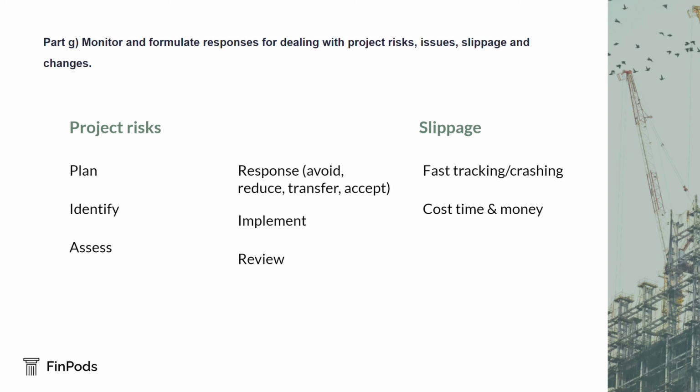When considering a change, the project manager should conduct an investigation to discover: a. The consequences of not implementing the proposed change, b. The impact of the change on time, cost and quality, c. The expected costs and benefits of the change, d. The risks associated with the change and with the status quo. The process of ensuring that proper consideration is given to the impact of proposed changes is known as change control. Changes will need to be implemented into the project plan and communicated to all stakeholders.